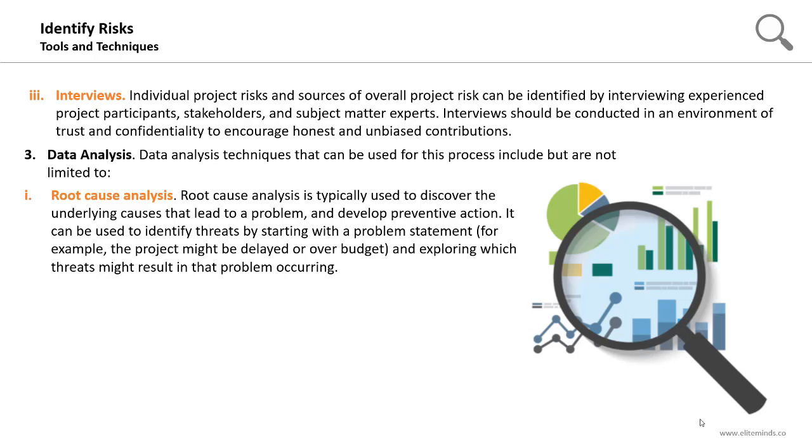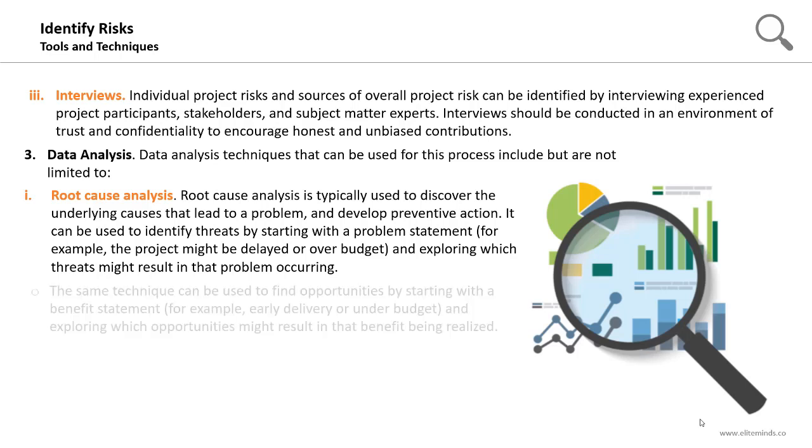It can be used to identify threats by starting with a problem statement. For example, the project might be delayed or over budget, and exploring which threats might result in that problem occurring. So this is how you will apply the root cause analysis to identify the project threats.